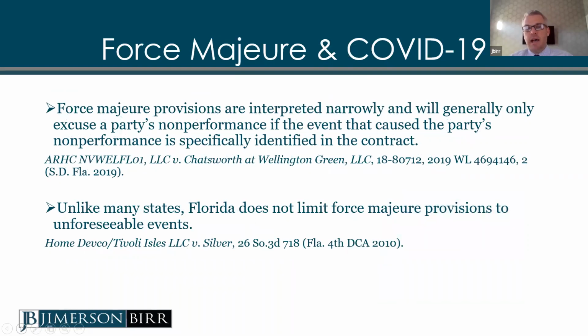This is a similar slide to what I was just mentioning in terms of how force majeure provisions are interpreted. They are going to be narrowly interpreted, and you need to make sure that the issue that you're saying is a force majeure event is actually covered by your contract. And unlike many states, Florida does not limit force majeure provisions to unforeseeable events. So you can contract for other types of events. So if you're using a standard form contract, I would encourage you to take a look at that force majeure provision and revise it to cover all types of events, including those that we're dealing with these days.